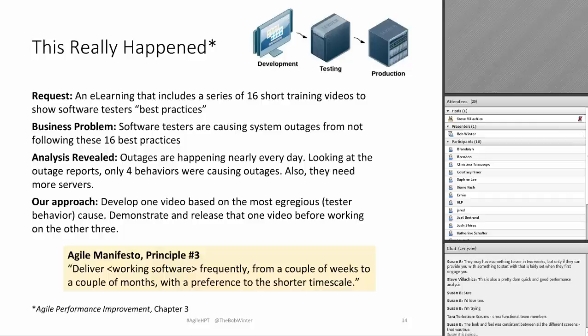The difference is that once you finish that first sprint or that first quarter, you're revisiting and replanning, right? So you're not doing detailed, intricate planning of every single thing that's going to happen over the next month. You're going to do careful and detailed planning of what's going to happen in the very short term, and then revisit the rest of that plan all along the way. Sometimes they say waiting until the last responsible moment, right? Do the thing that you know you're doing now, and when you're done, then look at the next thing. So those are just a couple of things. I don't know if any of that is helpful, but those are the things that popped into my head when you told us that story.